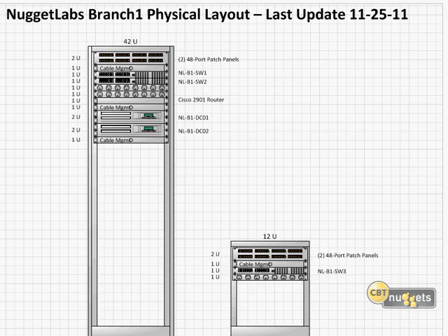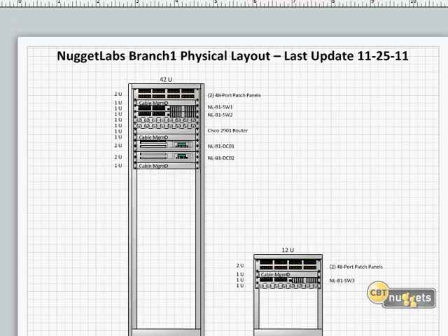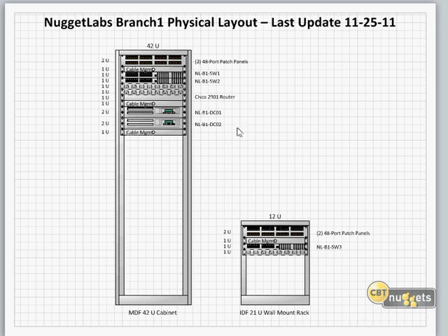This is the physical layout. What you will do when you document this is literally show where things are going in the rack. Now this is before you install. This is not something where you install it and then go, okay, let me create a Visio diagram. Sure, that's better than no diagram at all, but this is before you do it because there's nothing worse than getting there and finding out you don't have enough space in the rack or something doesn't line up right.